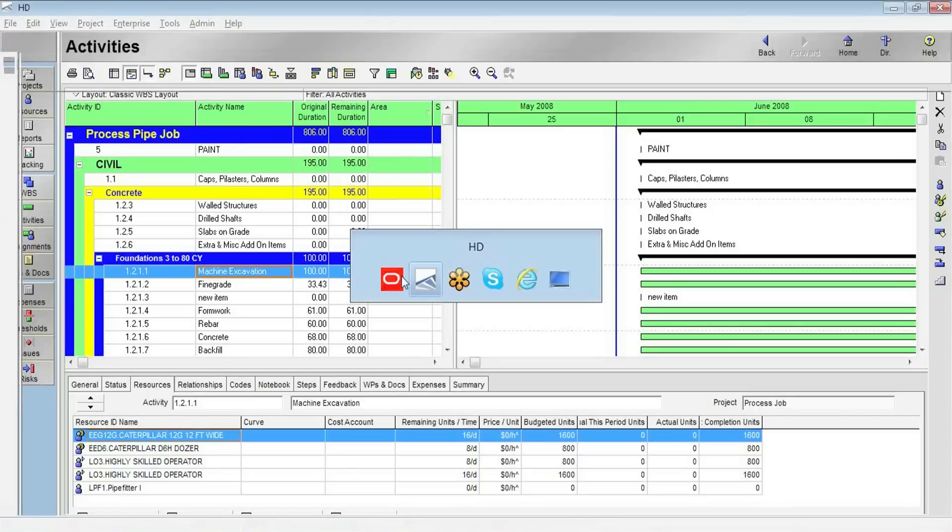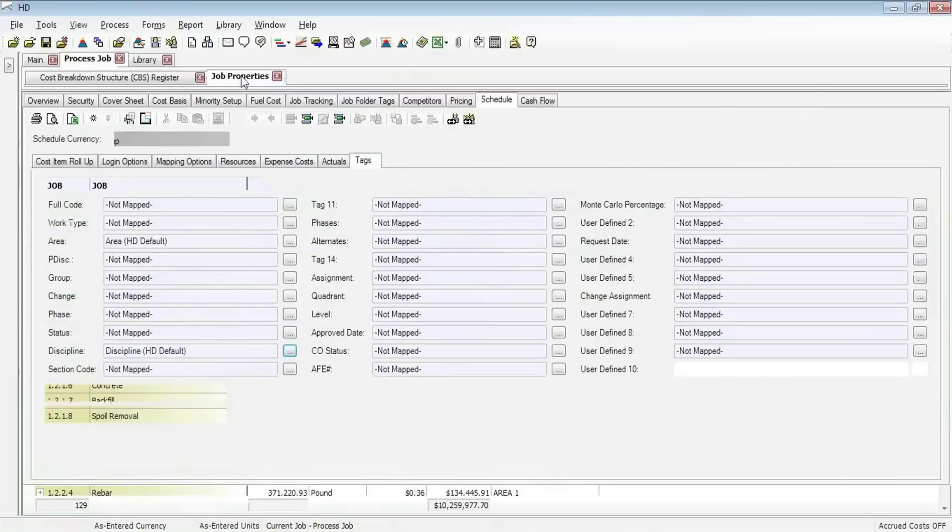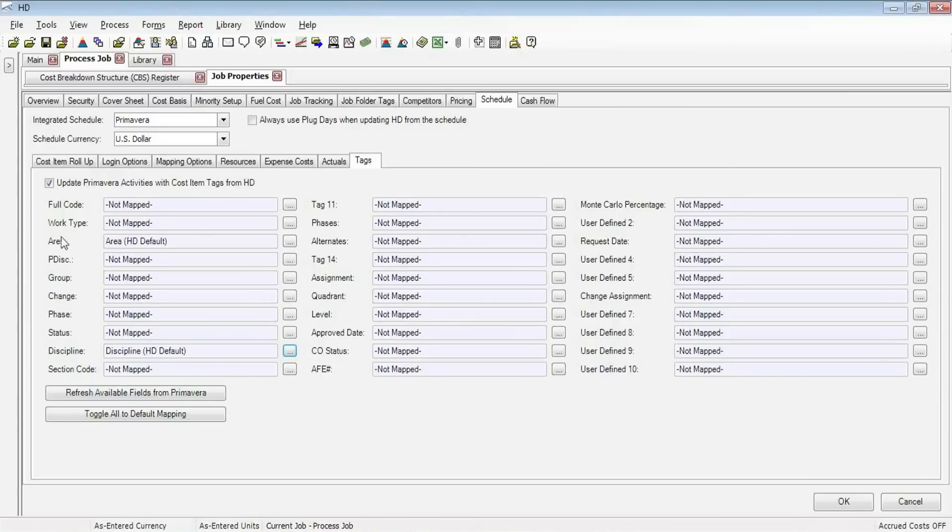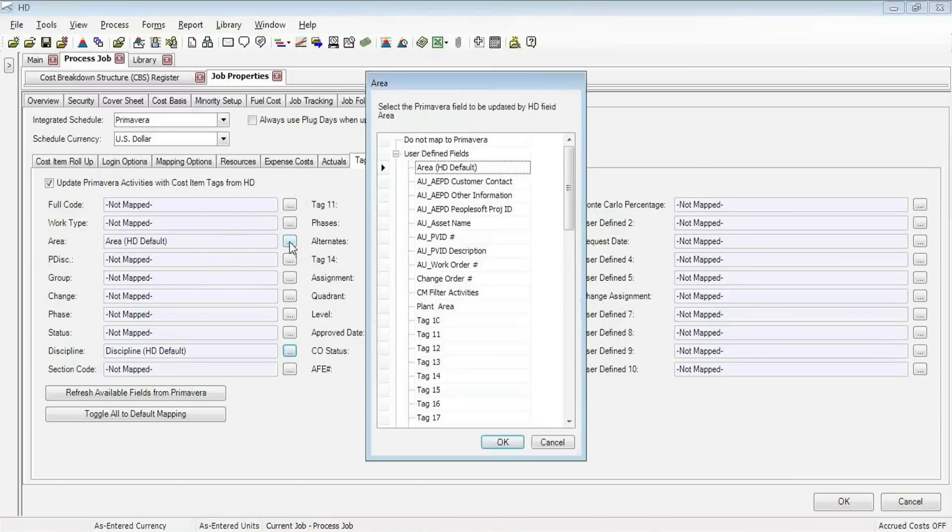Inside of the job properties in Hard Dollar, if I go there, you can see that on my Schedule tab and then under the Tags sub-tab, I have the ability to assign what user-defined code or field Hard Dollar will match up with in Primavera. As you can see, I've already defined that here. The area tag in Hard Dollar is matching up with the area default that it automatically populated into Primavera.